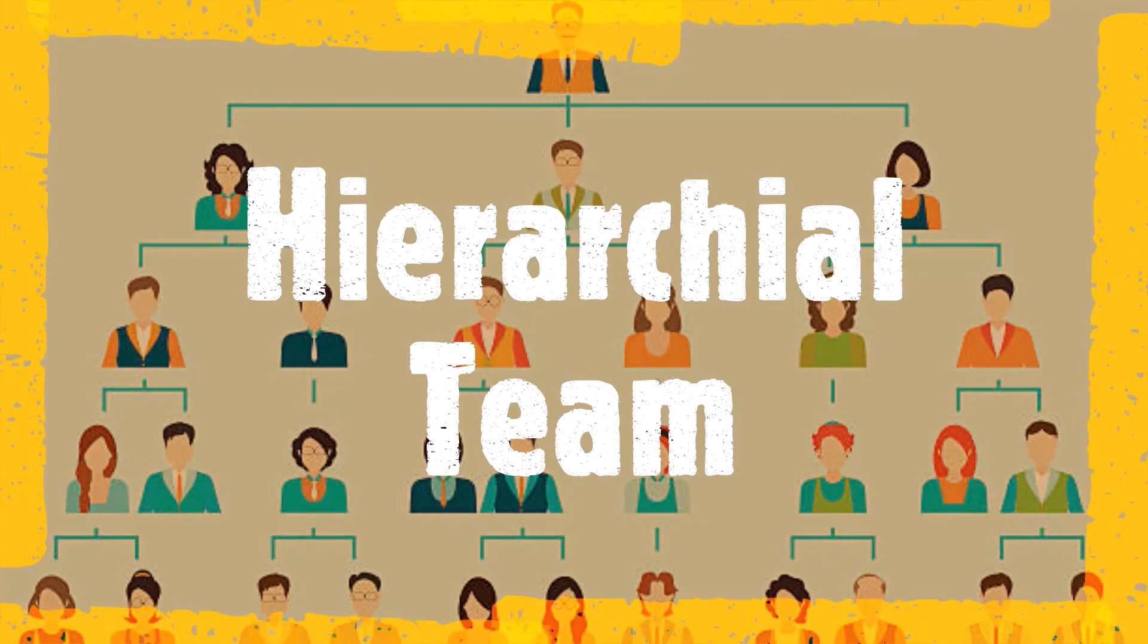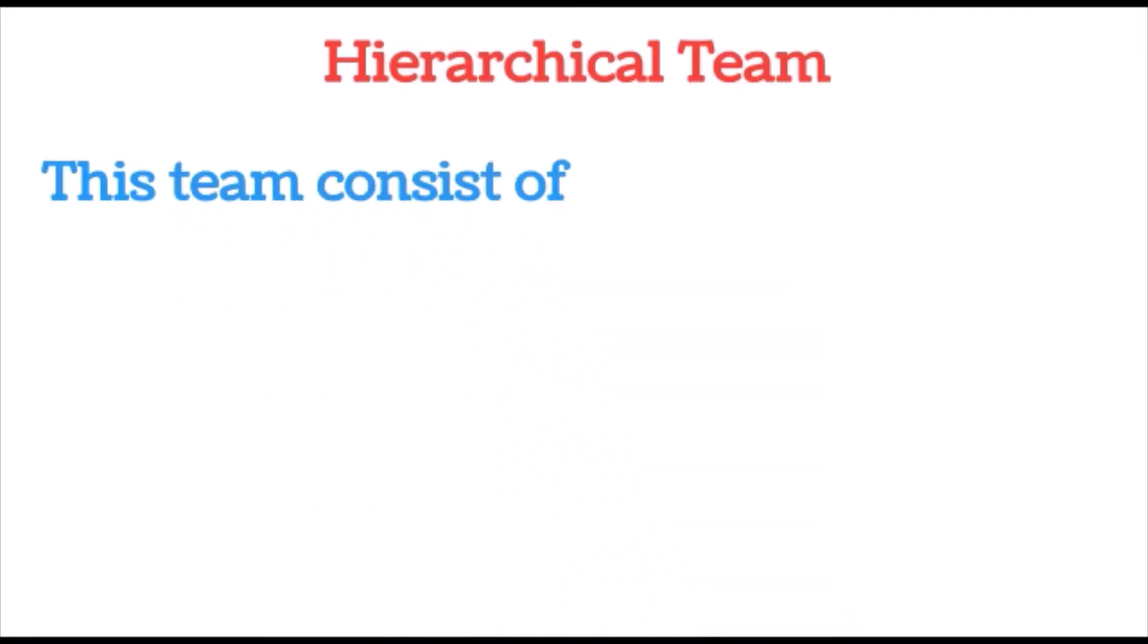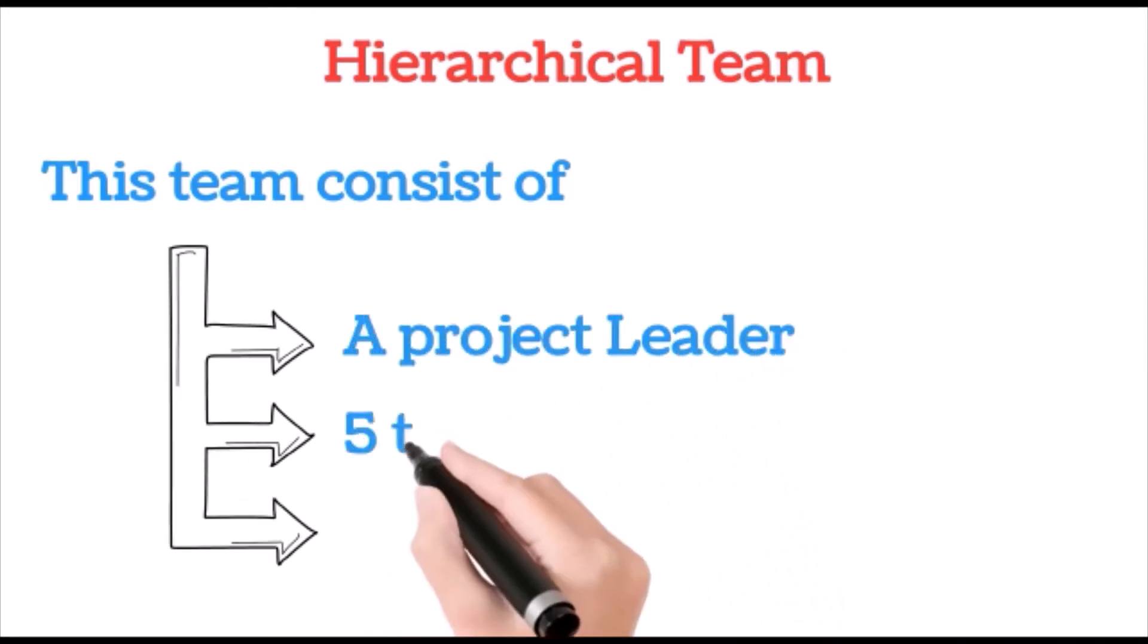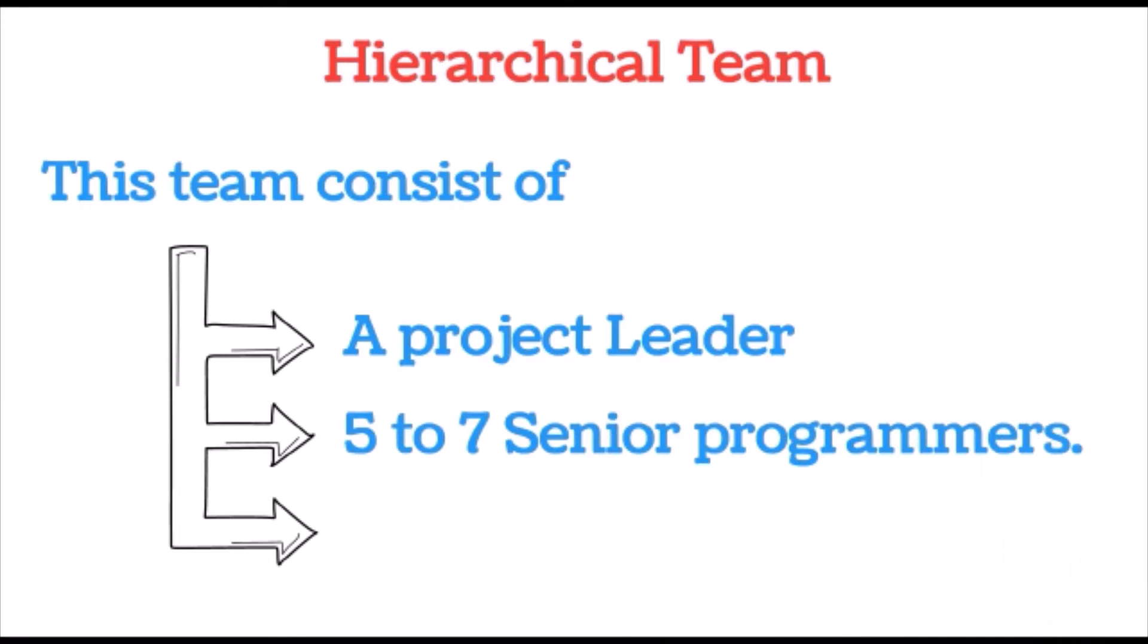Lastly we are going to see about hierarchical team. This team consists of a major project leader, five to seven senior programmers, and five to seven junior programmers.